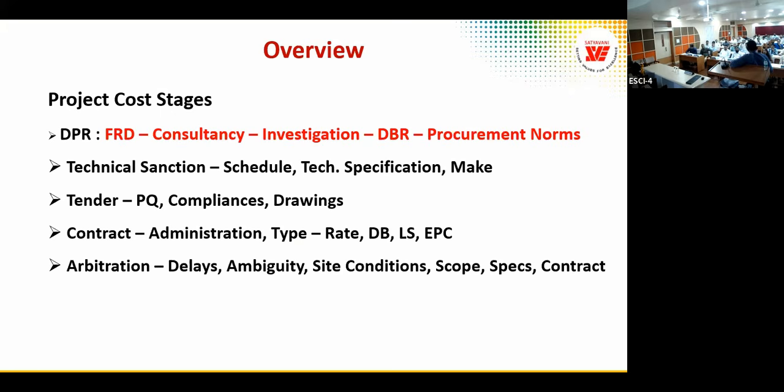So pre-qualification. In one project where I felt that the department guidelines were not adequate, I felt that I had to go more stringent than the department, more stringent than CVC, for that one particular project. Then I made a presentation in the DPR itself to the client that I'll follow this pre-qualification, where I introduced current net worth. In most of the projects, you see net worth. Yes, net worth. Net worth positive.